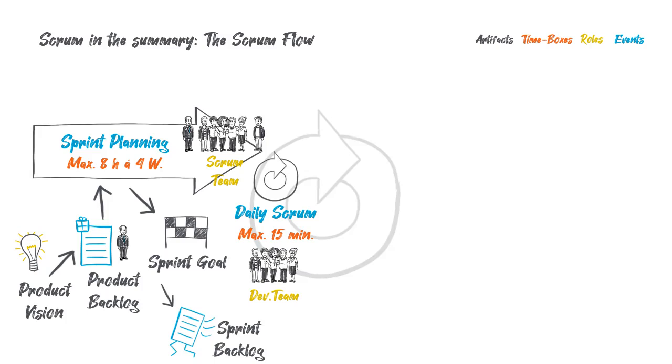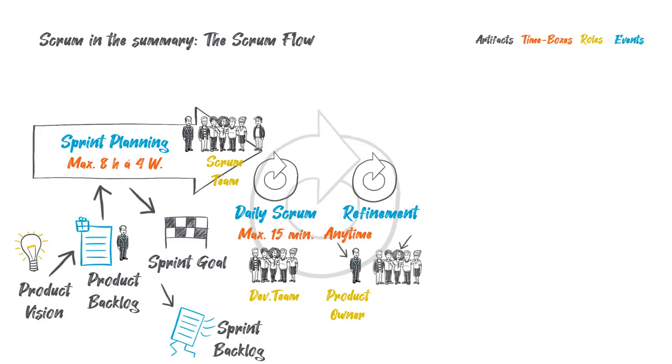Refinement is a process that takes place continuously throughout the sprint. The product owner makes refinement permanent. The development team helps him to do so. However, it may only use 10% of its capacities for the entire activities of refinement. The Scrum Master supports the team when he is asked or needed. The refinement can be divided into 3 phases, which take place together rather than consecutively.